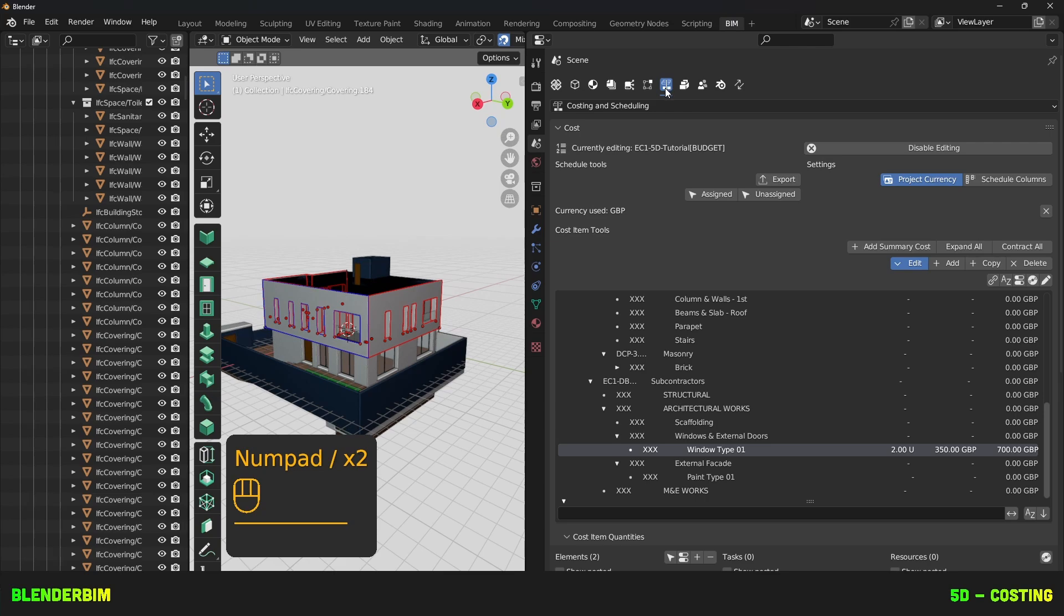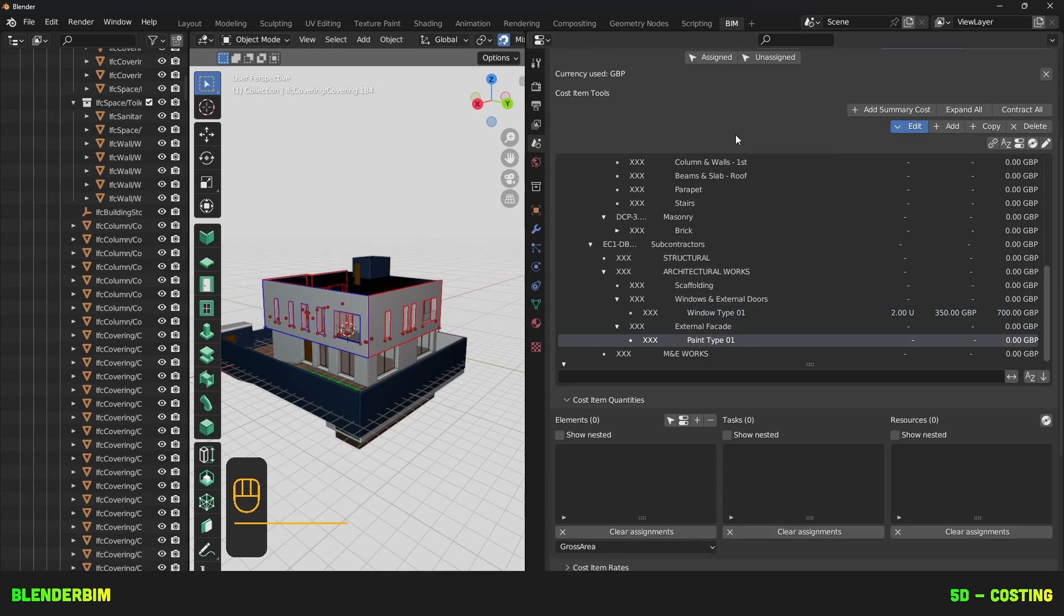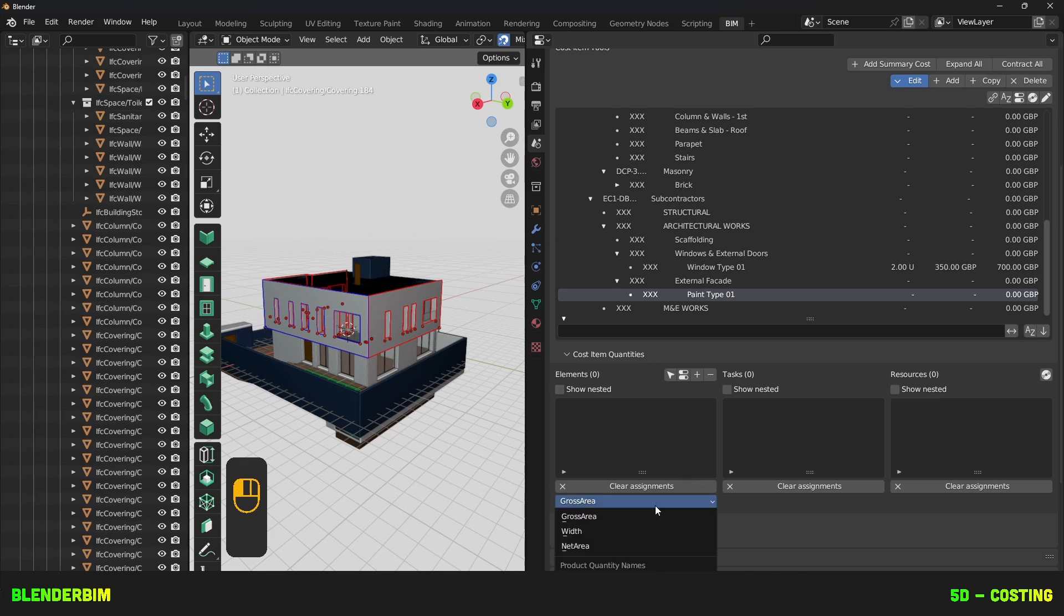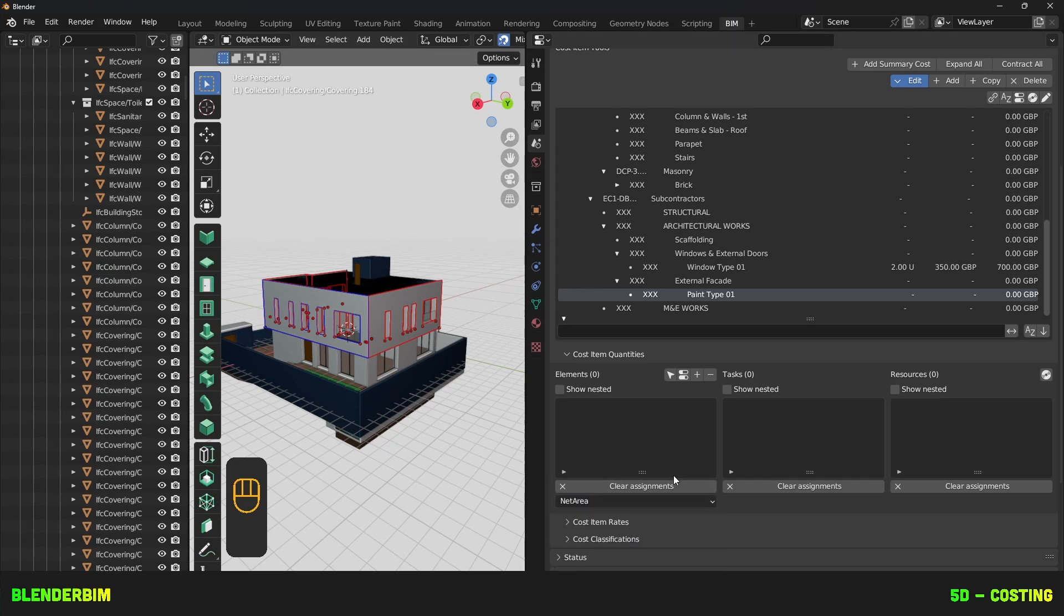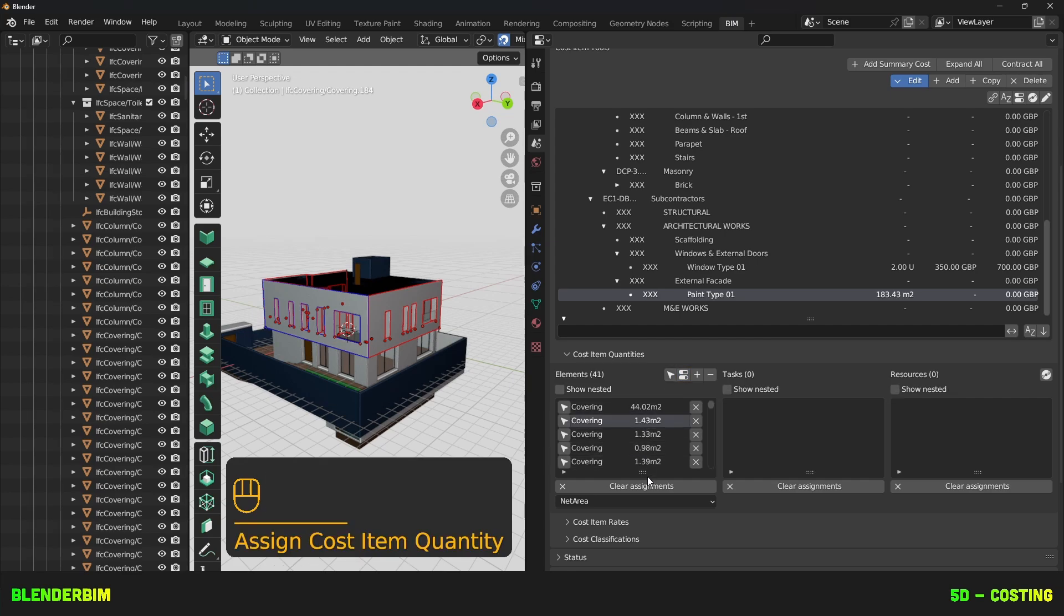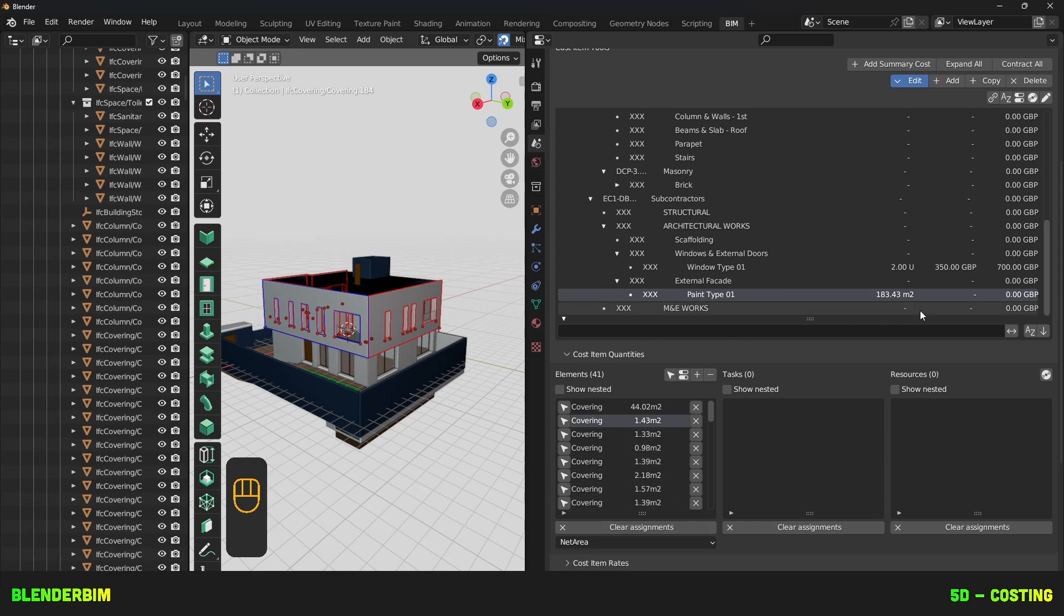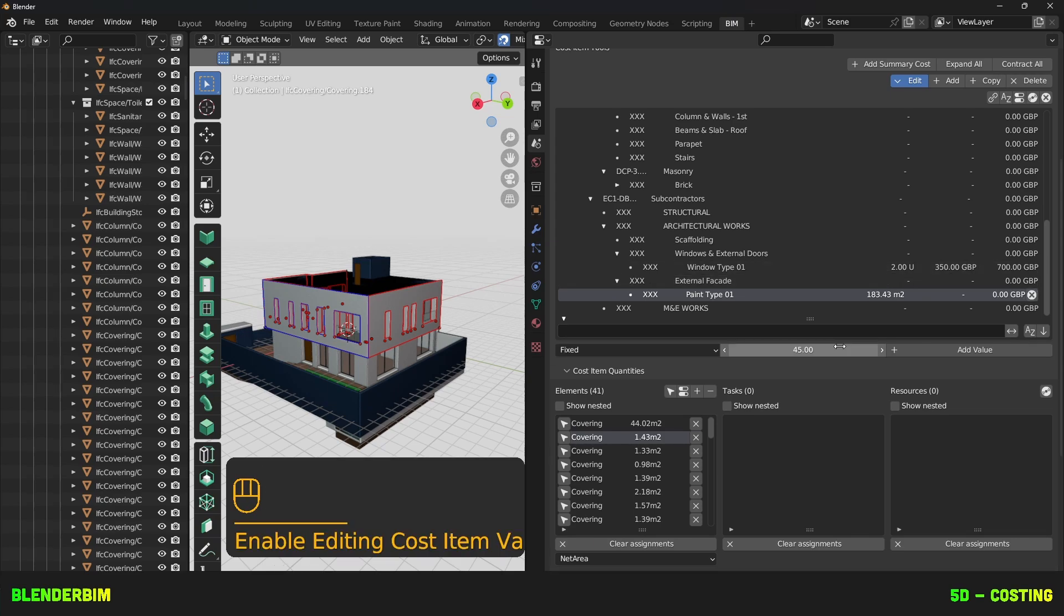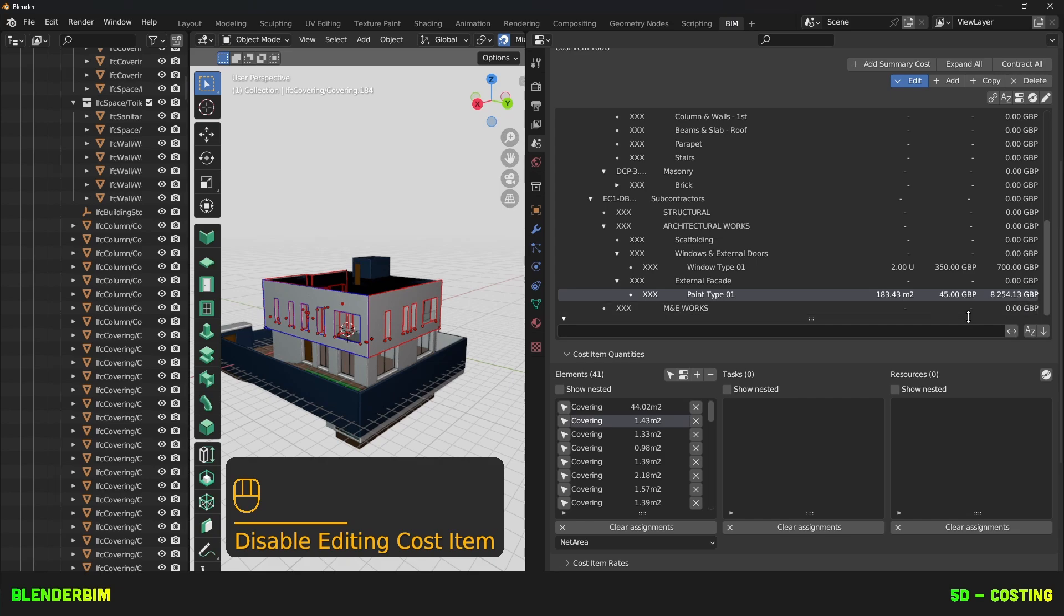Let's go back to the Scheduling tab, and under Paint tab, we'll look for these Elements tab here. And here we have a dropdown with the quantities we can select from this selection. So we'll choose the net area, and now we'll press on this property looking like icon, and boom! It's not only assigned, but we also have all the quantities taken up for us. And with the price of 45, we now have a nice total right here.